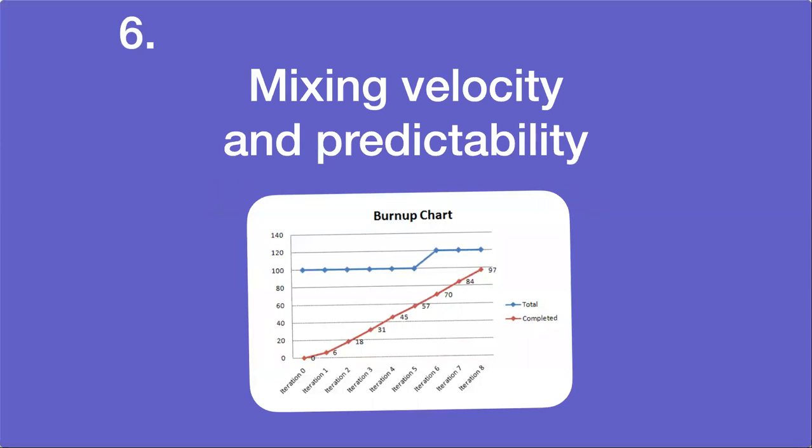From the agile world, one of the most common metrics used to be something called sprint velocity. So basically estimating story points and then looking at how well are we doing against what we planned for this sprint. And it's a little bit misleading because it's called velocity, but it really doesn't have a lot to do with the concept of velocity as we understand it from elsewhere. And the thing is that the team decides themselves how they want to estimate this work, and then you're kind of just following how that's going.